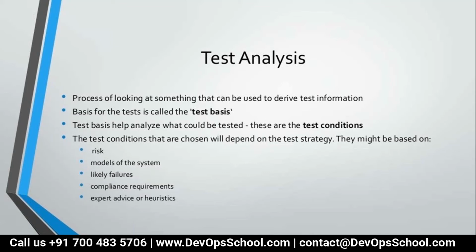So whenever the work is 136 or 120 or 100 hours, you should include all the probable risk factors, at least one day leave for each and every person, minimum 2 days you can mention, and estimate the time like that. In the test strategy, you are not going to mention that this resource is going to take 1 day leave. No, you can increase the hours only. If we are able to test a project in 100 hours, you should estimate it as 120 hours.